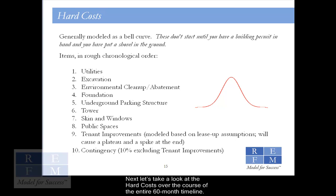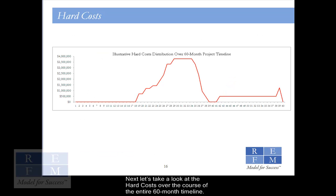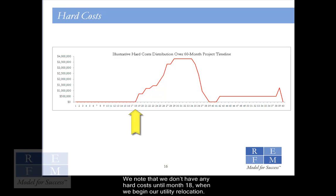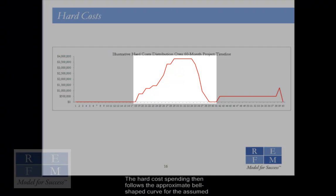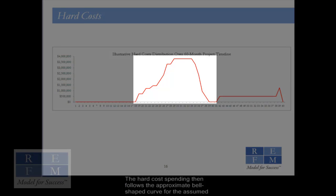Next, let's take a look at the hard costs over the course of the entire 60-month timeline. We note that we don't have any hard costs until month 18, when we begin our utility relocation. The hard cost spending then follows the approximate bell-shaped curve for the assumed construction schedule.